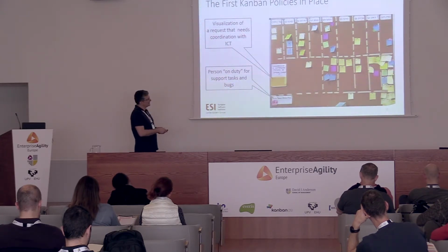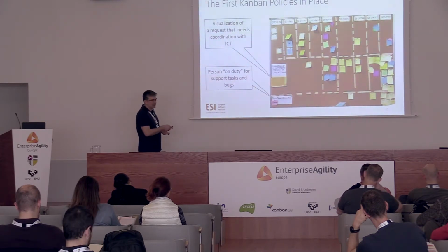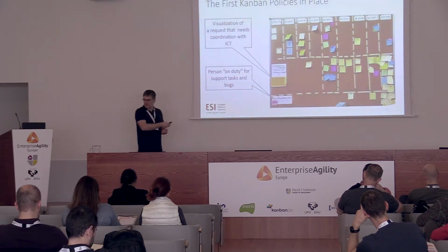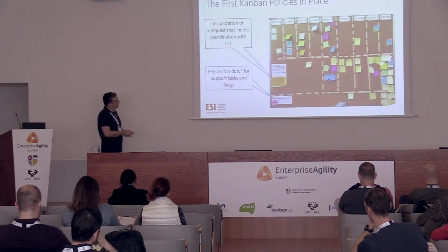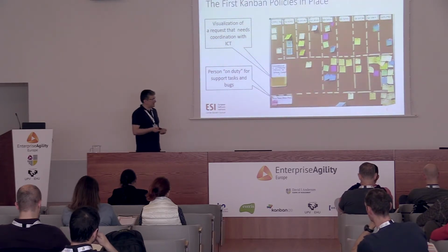But you see that these are shifts. The first week is ACHO, second week is Ivaylo, and so on. They change the person in duty of the bugs. And all this we name in Kanban as policies.